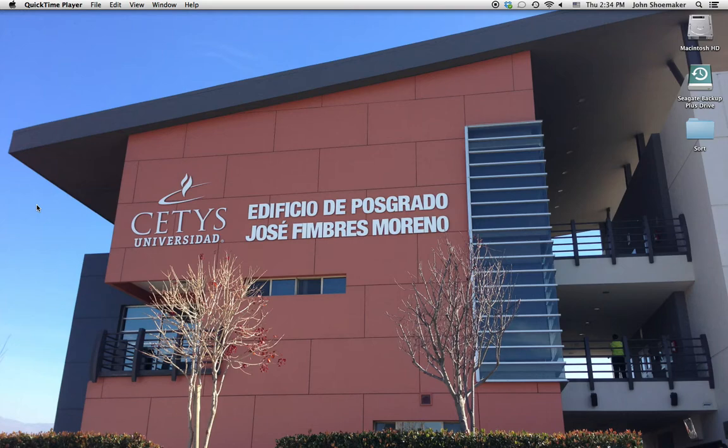But also, it's easier to estimate small things than it is big things. And work packages are much smaller than the project as a whole, and hence we can come up with more accurate estimates of work packages than we can of the whole project. So what we can do is add up our estimate of the cost of all of the work packages, and that should give us a good estimate of the total cost of the project.